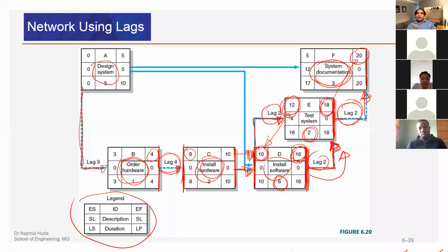There is no solid answer to that. It depends on the project network diagram. So there are multiple types of lags. Depending on the suitability, you can use any type of lag, from start to start, start to finish, from finish to start. So there is no such thing as which one is better than the other. It depends on the project planning and preparation process. In some cases, we may need to restrict the completion time. In some cases, we may need to restrict the starting time. Depending on the suitability, we choose ourselves which lag we will be using.